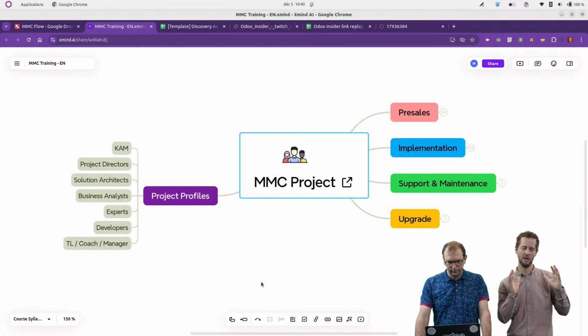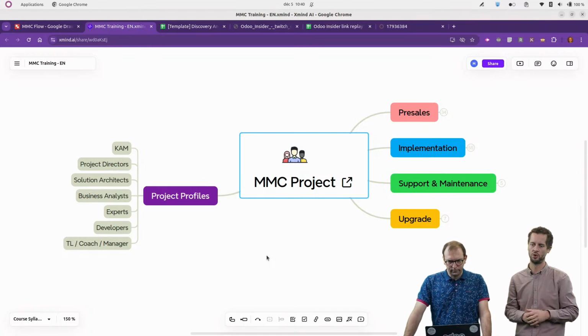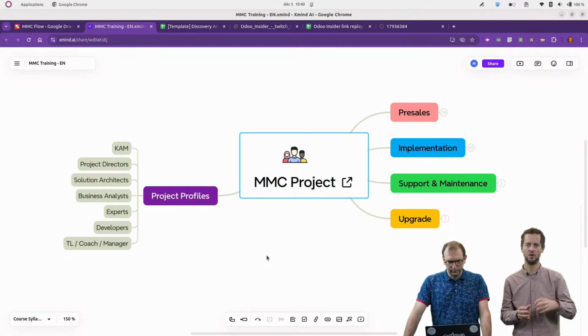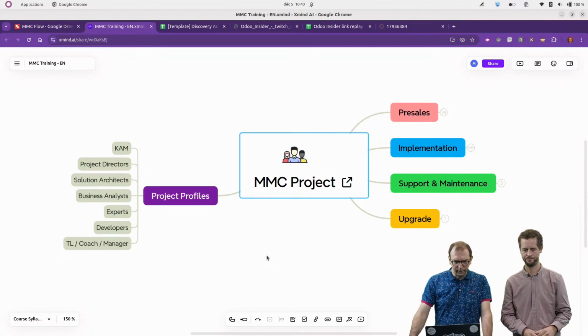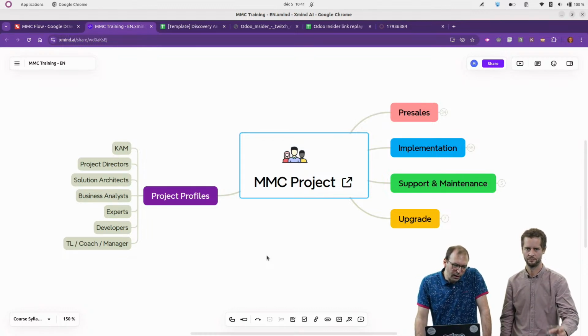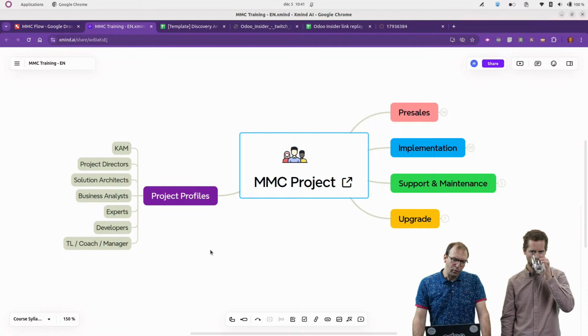So here we really try to have the smallest team possible and try to pick the right resource at the right time, to not have a super big budget, and try to make the best use of the budget we already estimated during the ROI analysis. And so people come on the project and leave the project all the time, but we try to keep one, I would say, core team that will handle the entire scope, to not lose information and to not lose, of course, efficiency.